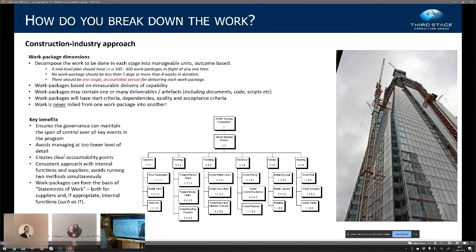So work package one would be install switchgear from mains distribution. Work package two would be run power up to the risers floor one. Work package three might be install wiring across floor one. Work package four would be install outlets and switches across floor one, etc., etc. And then you move on to floor two, and they'd get paid on floor one.